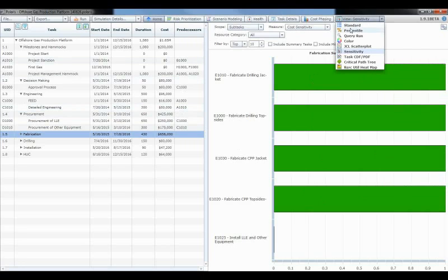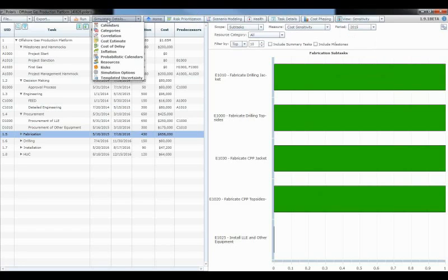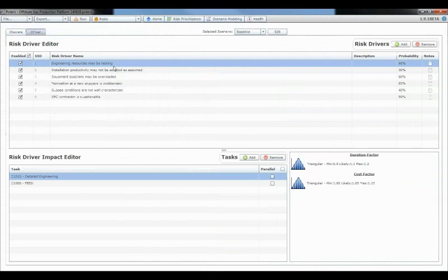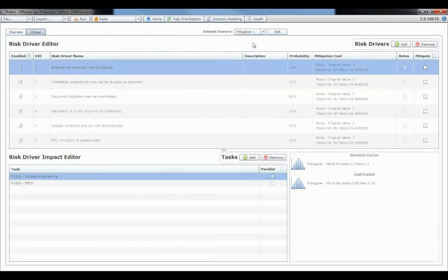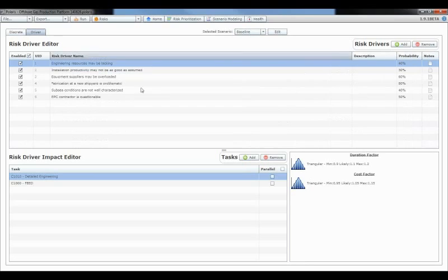And so from that perspective, going into more of the risk management way and how we would like to do risk management, we like to first go through and do the initial analysis. Then we want to go through and do mitigation options. Recently, we added some new functionality in here, which allows you to do different risk mitigation scenarios. So it's basically mitigation scenario modeling. By doing that, you can look at the baseline. This is the initial risk register that you brought into the tool.